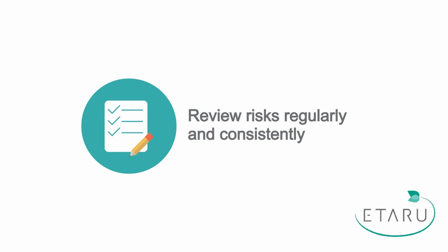Finally, we need to monitor our risks closely and constantly. The best way to do this is to review our risks at regular project meetings. This will help us reprioritize and add any new risks that pop up during the project.